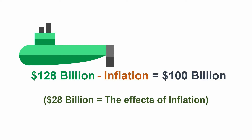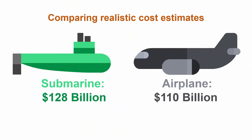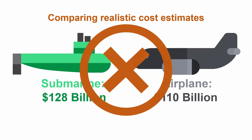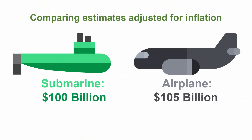If you find this confusing, don't worry — we'll cover it in the next two videos as well. In conclusion, a realistic cost estimate derived from escalation rates is useful because it represents the actual amount of money the government will spend on a program. However, cost figures using escalation rates cannot be used to examine trade-offs, because escalation rates reflect the unique components of a program. You need to adjust for inflation to do that.